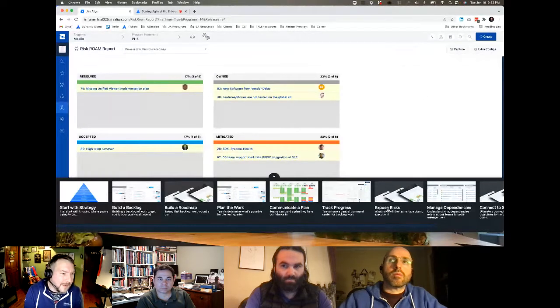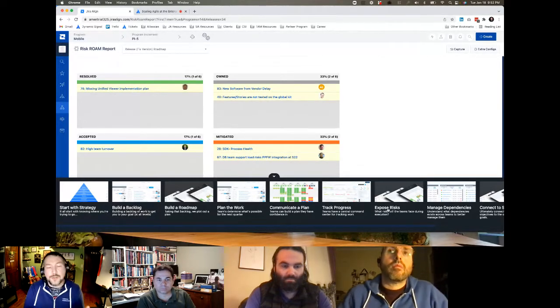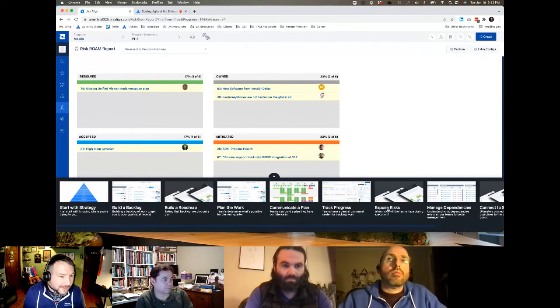Because honestly, for me as someone who's leading a team of teams or somebody who's even a scrum master on a team, I want to understand where my risks are at. I love the fact that I see resolved ones, but things that are owned and things that are even accepted, I want to worry about a little bit because these are things that are potentially going to happen that we have no plan around yet. So it gives me the ability to keep up on these.